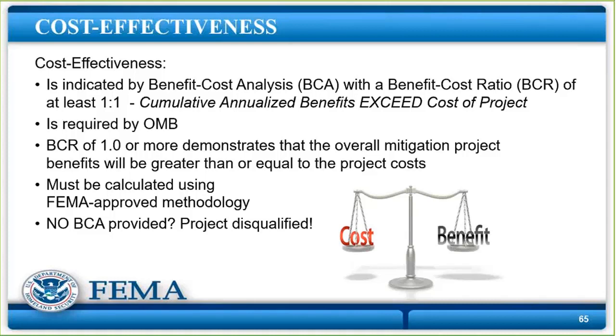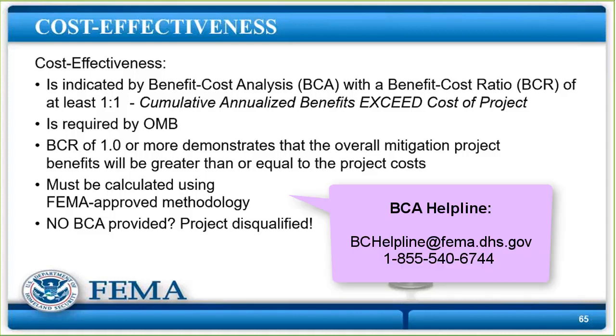If, for example, you come in and you say, wow, I did the work and we only come up with $78,000 worth of benefits and our project's $100,000. Well, here's two situations, okay? Number one, if you just look at it that way, you've got a gray infrastructure project, let's say, and it's $78,000. Or you've got a flood buyout and it's only $78,000. There's some situations where you just would have to say, no, we can't submit it. It's not going to be cost effective.